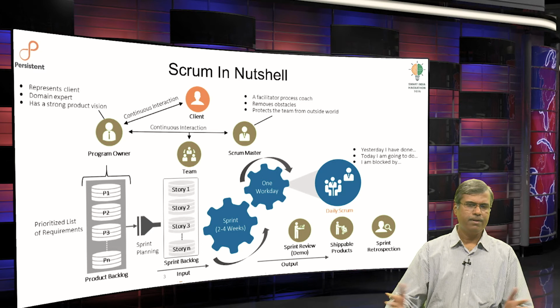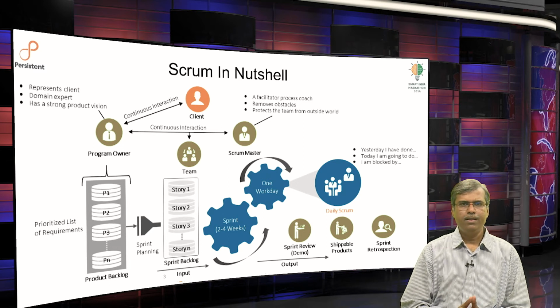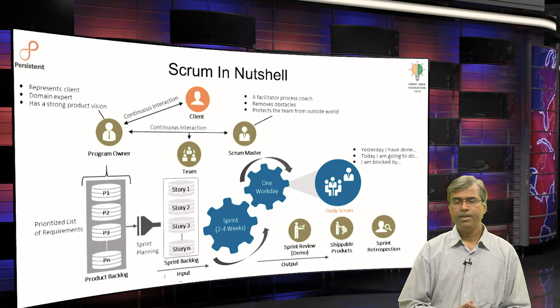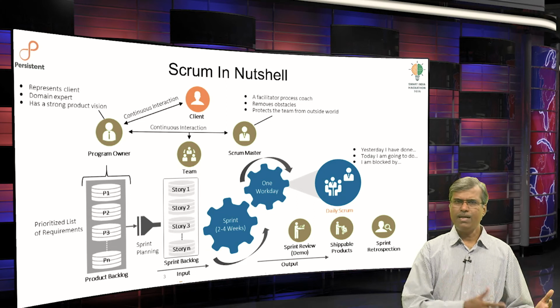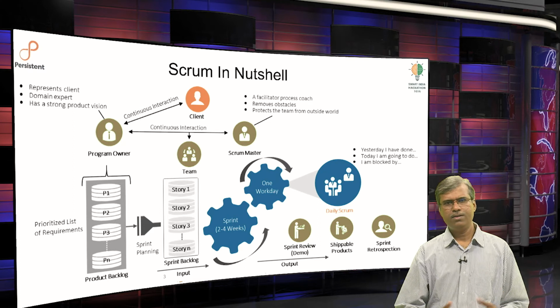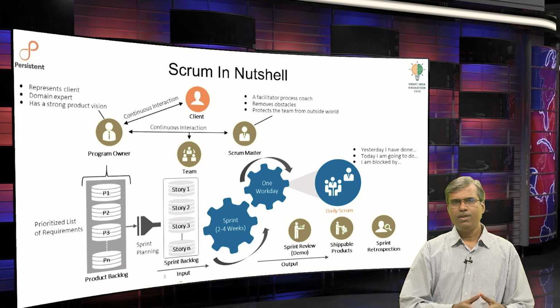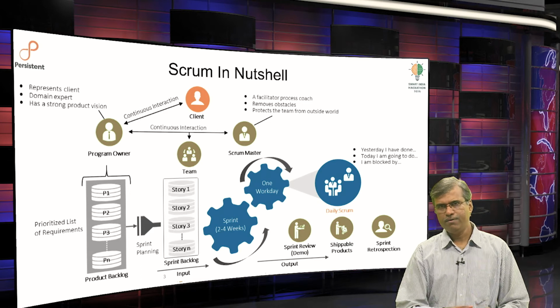Longer than 2 weeks may not be an agile characteristic, because here you want to have a frequent and incremental delivery of the software. Less than 1 week may not even work, because you need a substantial amount of time to actually work upon the stories and have a meaningful feature developed.